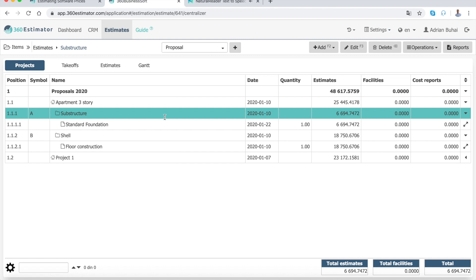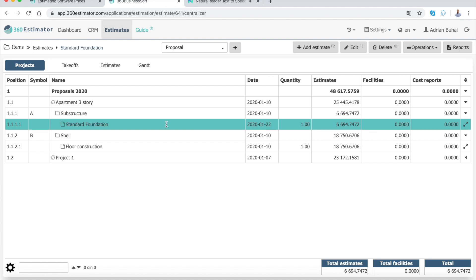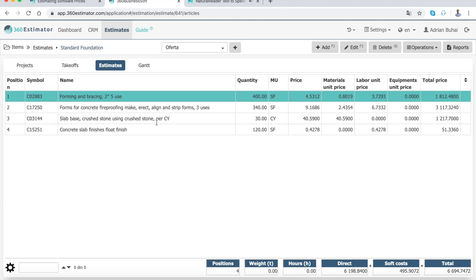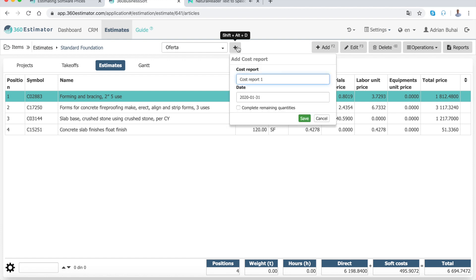Select the project division or estimate for which you want to create a cost report, for example, Standard Foundations. Move on to the Estimates tab, and from the top of the table, press the plus button from the right of the proposal box. Enter the name and date of the cost report, for example, Cost Report 1, date 31 January, and press the save button.